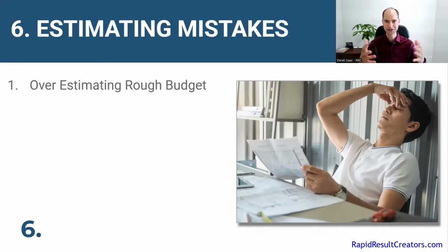As we go through the selections, the design, getting supplier quotes and getting quotes from our sub trades and everything, the budget will fluctuate up and down and could change 5-10%, possibly even more, depending on how things go and choices you make. So you want to make sure that initial rough budget is fairly low, very basic, and you want to communicate that as far as expectations go, like this is our basic budget, this is the price as of now.